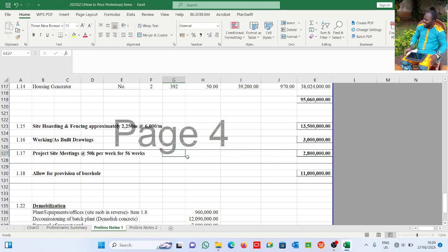Now of course, you really cannot ascertain what it's going to be. There are times you buy food, 3,000 naira, or maybe with drink, 4,000 naira. You're planning for 10 persons, just a site meeting. That is 40,000 naira. Okay, 10 persons, maybe 5 consultants, then maybe 5 from your own team. That's 40,000 naira and transport fare and all and all. So you need to account for that very well.